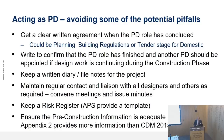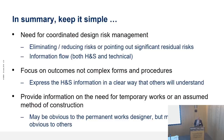We talked about the risk register on the previous slide. For the pre-construction information, I would suggest looking at Appendix 2 of the old CDM 2007 ACOP — it's got quite a decent and far more comprehensive list of what needs to go in there than what's in CDM 2015. As a final summary: with CDM, keep it simple. Focus on eliminating and reducing risks, pointing out significant residual risks, making sure there's an information flow, and focusing on outcomes rather than complex forms or procedures. With Regulation 9, think about it in terms of the three principles rather than the legalese. Provide information if there's a need for temporary works or assumed methods of construction — things may be obvious to yourselves as designers but might not be so obvious to others.